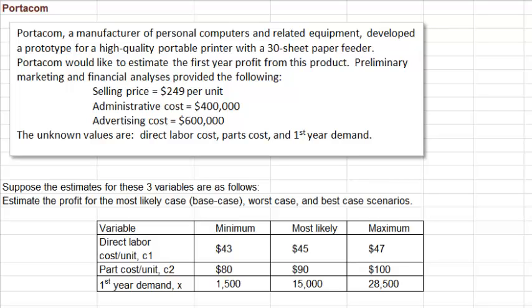For example, you want to calculate the profit you could make from a new product, but you don't have all the data you need, like the customer demand for your product. So what we do is assume a certain distribution for the customer demand, and then we could find the probability that the profit would be at least a certain level. The Portacom example here deals with risk analysis. This company, Portacom, has come up with a prototype for a new portable printer.